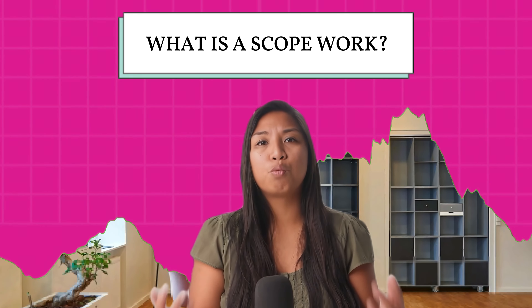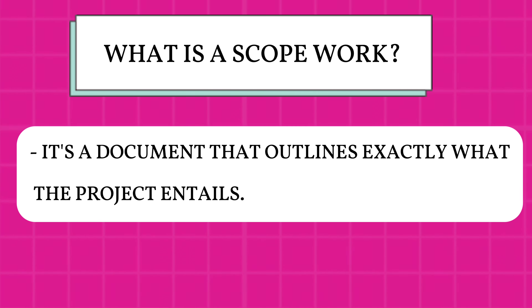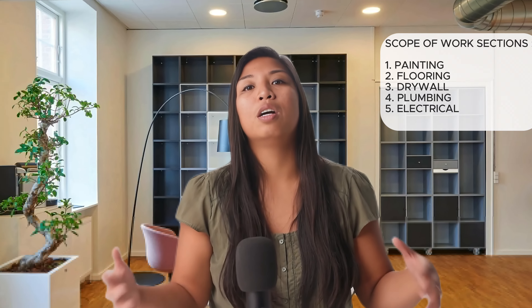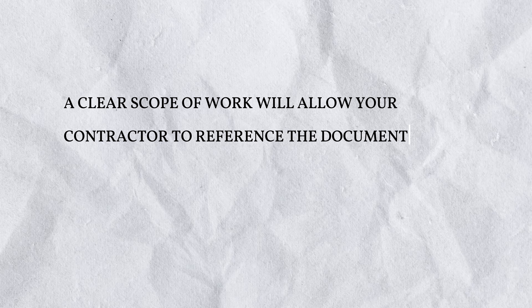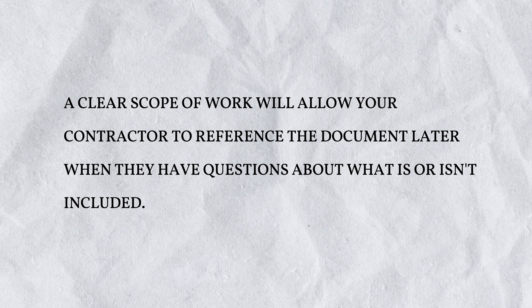What exactly is a scope of work? A scope of work is a document that outlines exactly what the project entails. Typically, this scope of work is broken into sections divided by each trade — which is painting, flooring, drywall, plumbing, electrical, etc. This document is essential when it comes to clear communication with your contractor. A clear scope of work will allow your contractor to reference the document later when they have questions about what is or isn't included.